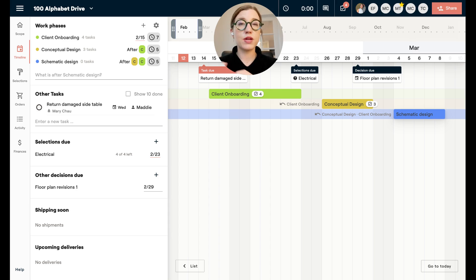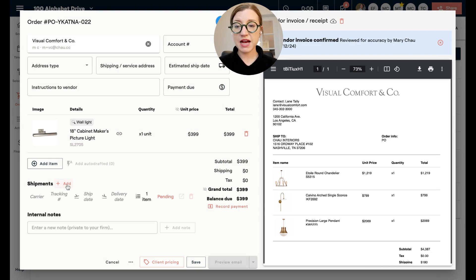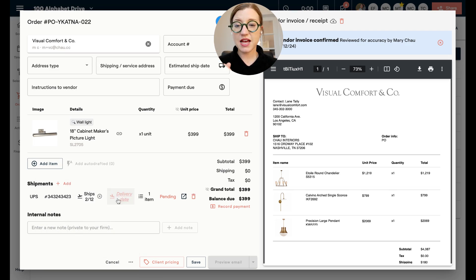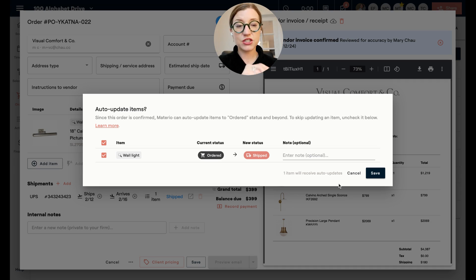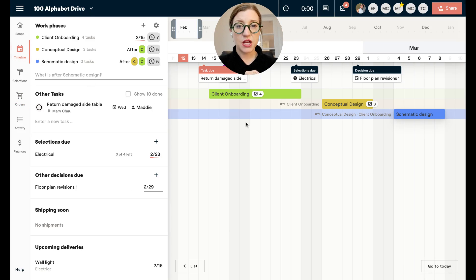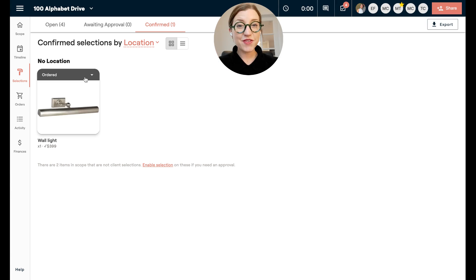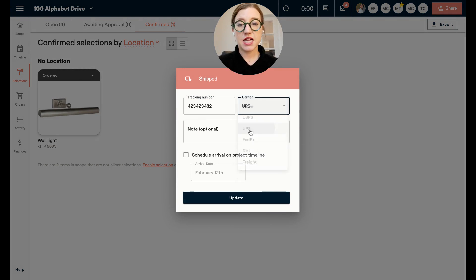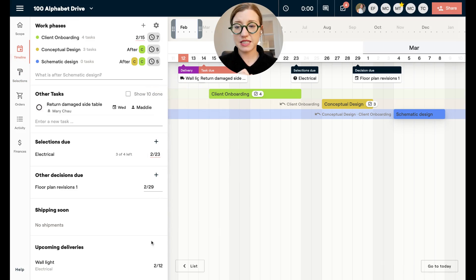The shipping soon section links up with your purchase orders, so as you're tracking products those show up on the timeline. For example, over in the order section, if you receive an email that an item has shipped, go to shipments, click add, paste in the tracking number, set the ship date and arrival date, mark it as shipped, and hit save. Materio will ask if you want to add it as shipped — say yes — and then on your timeline you'll see an upcoming delivery, such as a wall light, with tracking information already scheduled.